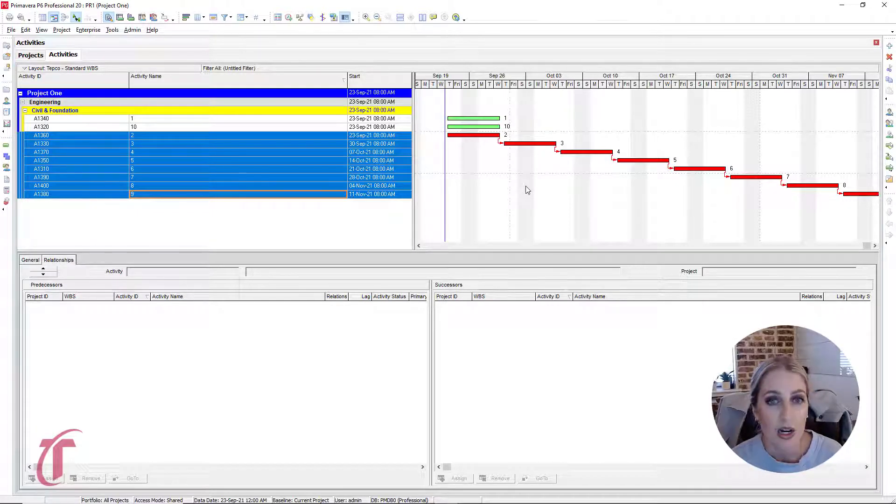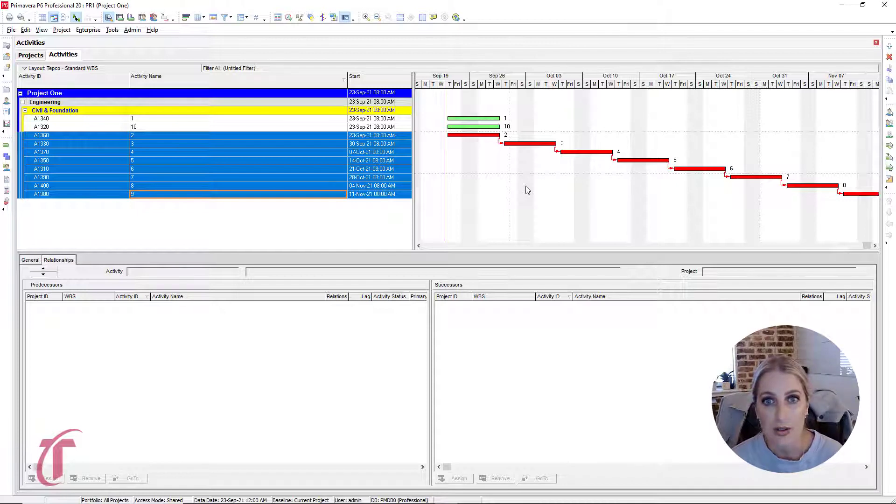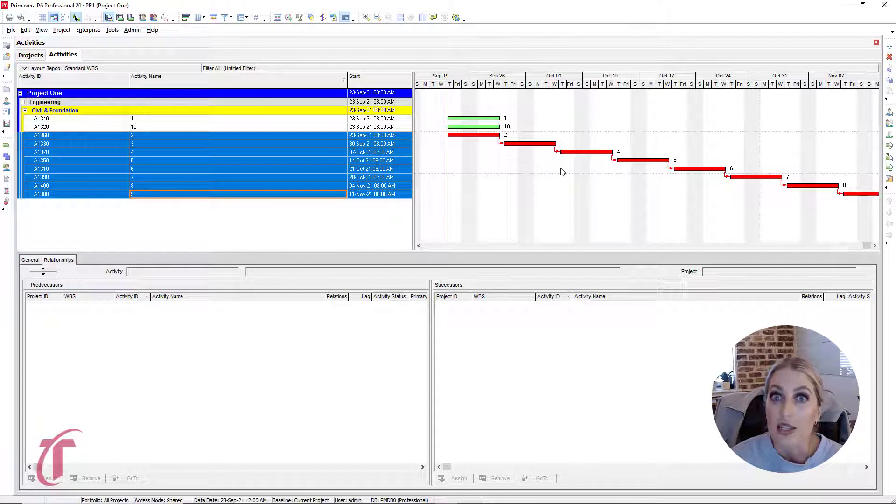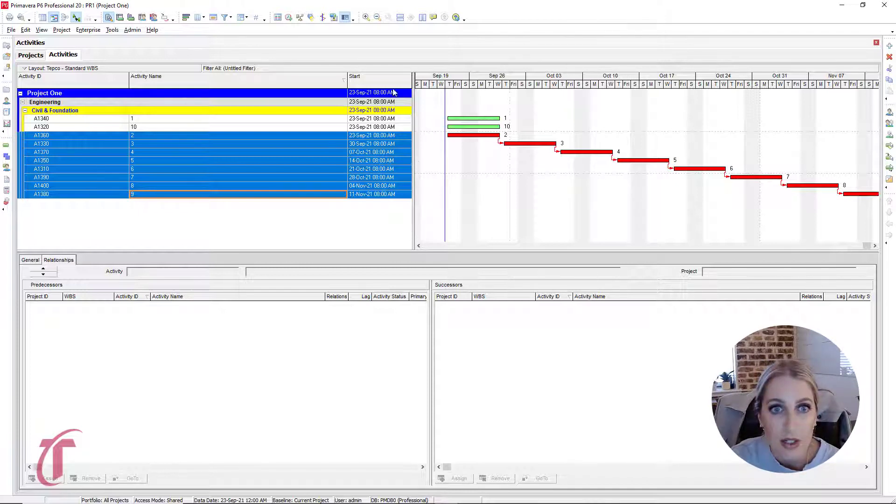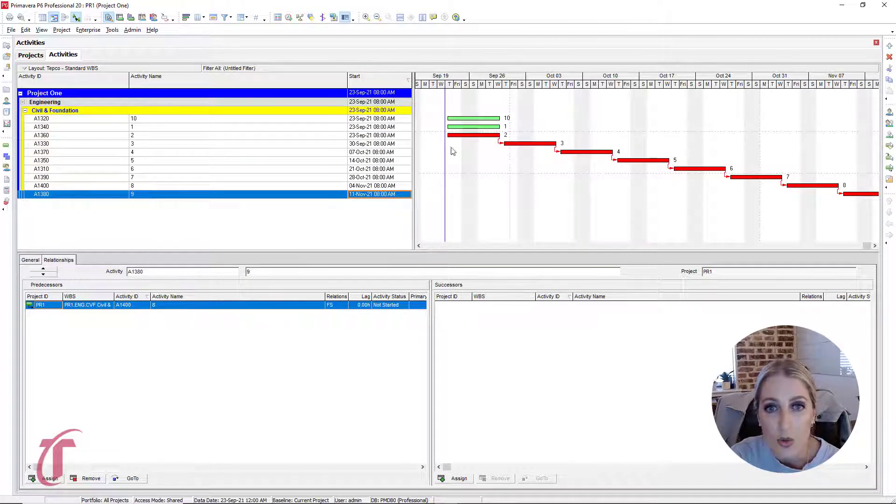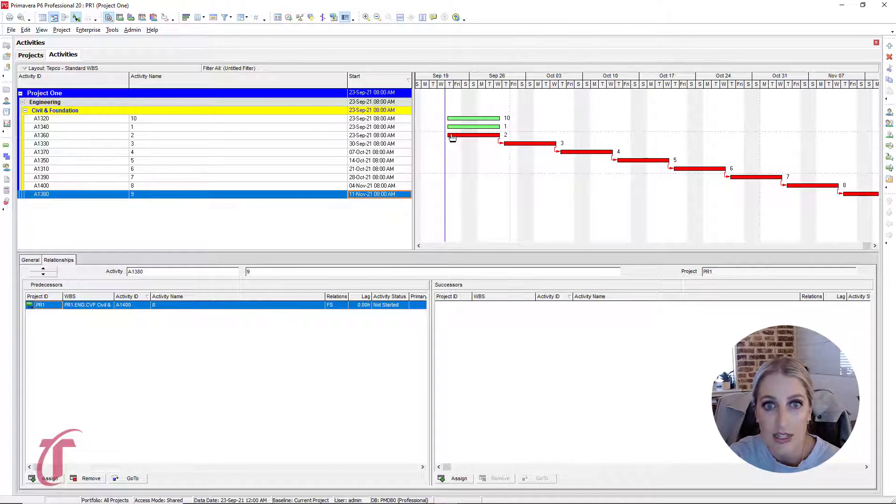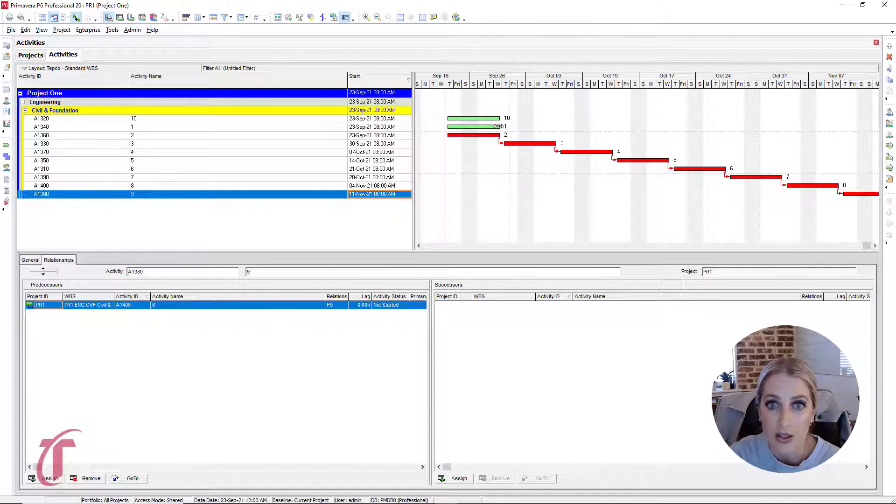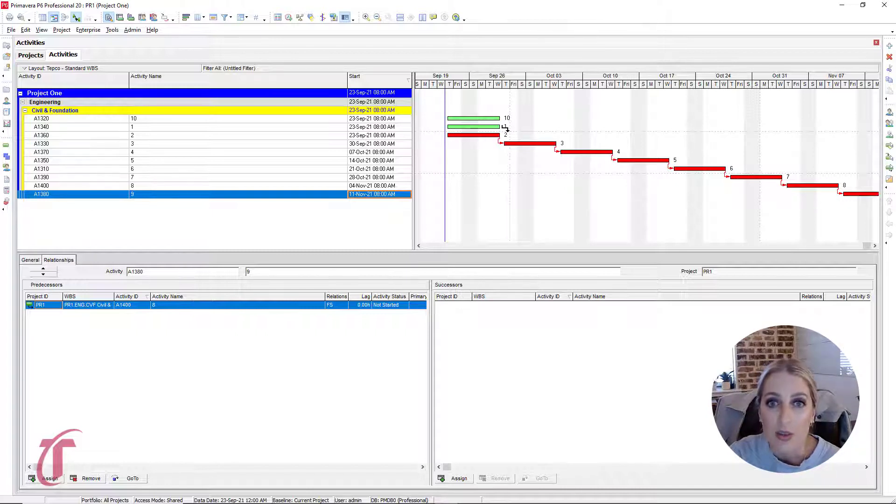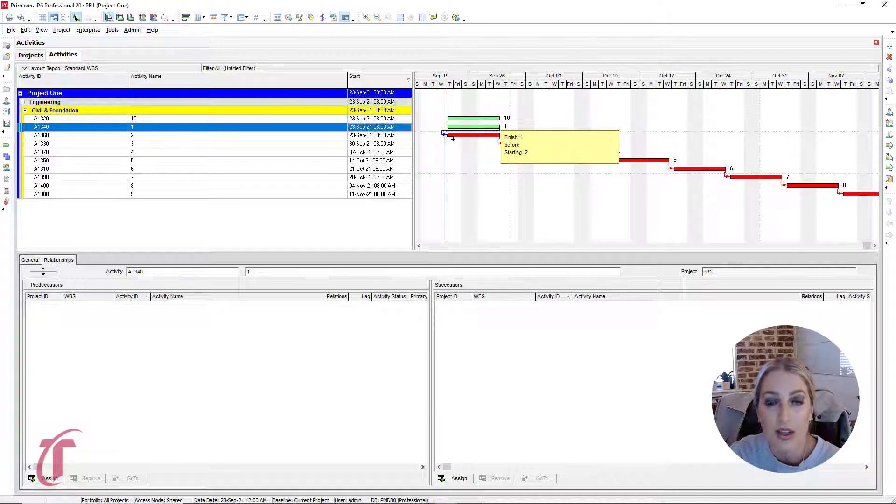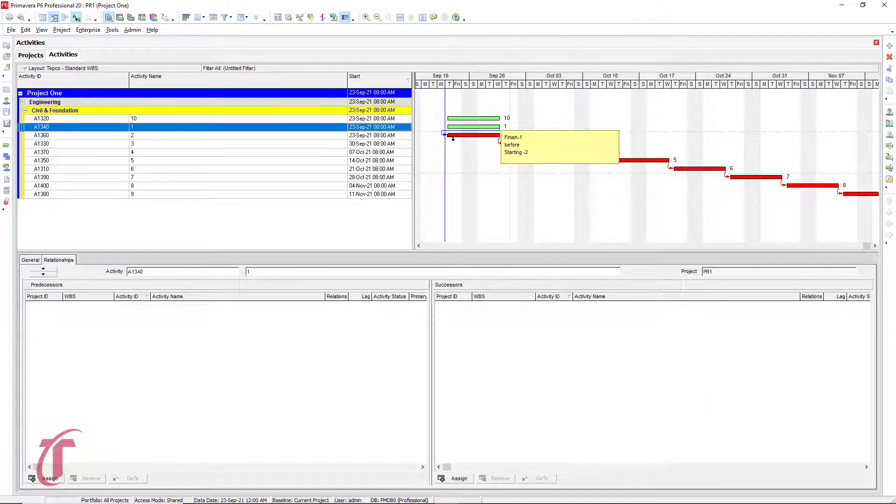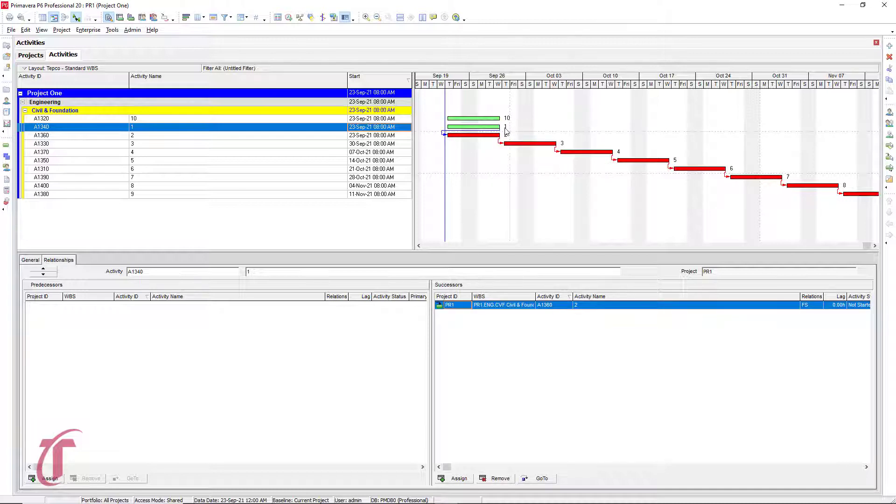So our other method that we can use, it's not as common, but it's still a way to link activities within the schedule, is that we can actually use the arrows within the Gantt chart to link these activities. So what I'm going to do is sort this based on our start date. And so what we need to do is we want to link activity one to activity two. So this is saying whenever we finish with activity one, then we want to begin activity two. So at the end of activity one, notice we have this little arrow that shows up. If we click and then drag to the front of activity two, we see this little pop up that says finish one before starting two. And so we can just release. And so now we have these linked right here.